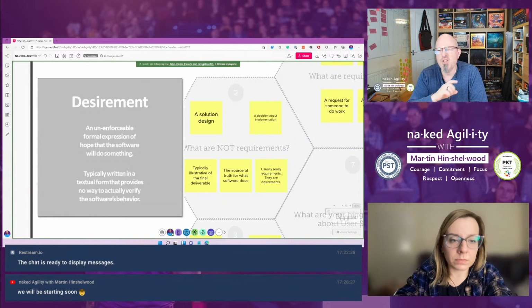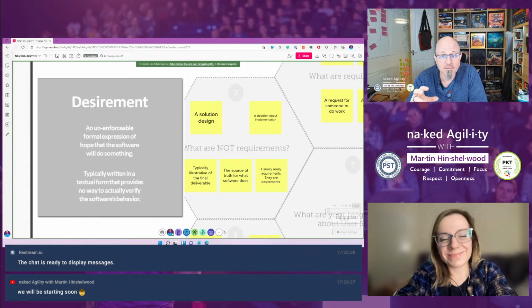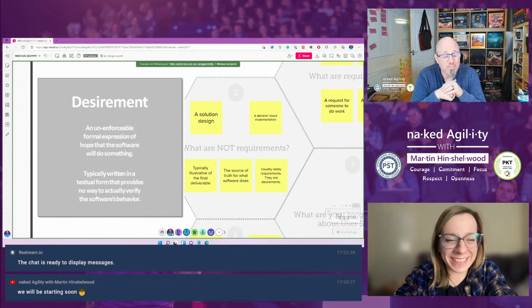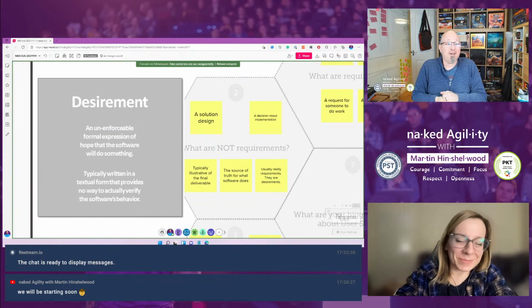We look at the story, and it's not enough information to actually build it. But it's enough information to start asking questions and poking at things. I've sat with a team once where they were asking questions of the product owner, and the product owner was giving answers and nobody was writing them down. And I'm like, what's going to happen at the end of this sprint? The product owner is going to say, I said that it should be like this, and you're going to have forgotten 10 minutes after the refinement session. We're solving this by recording the session. Yep, recording the session is a good way.